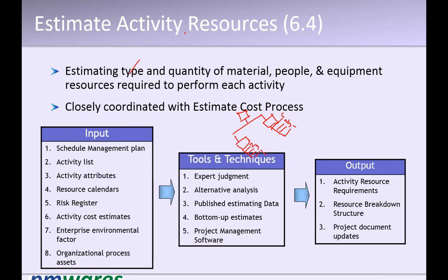Now you sum this up, the time required for this, if they are all in sequence, is 11 days, and time required here is 7 days if they are all in sequence. If they are in parallel, maybe it will be different. Then we sum this up at this level and say the total time required for this project is 18 days. So this is the bottom up estimate.